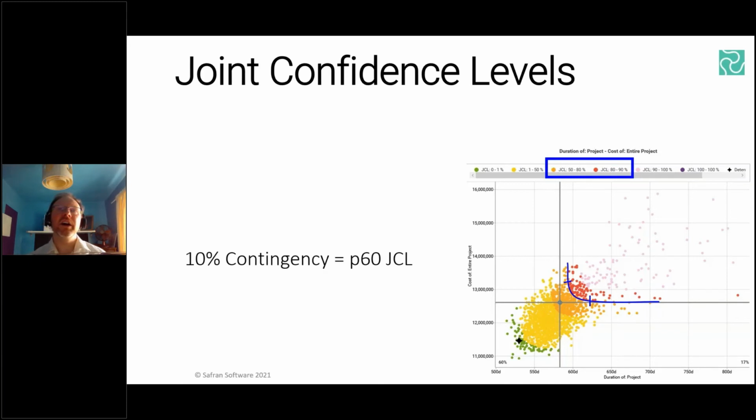And ideally, for a starting point, you're looking at a neutral initial pitch that doesn't favor cost over schedule and vice versa. So aiming for the inflection point of the blue curve, which I've added on for emphasis there, which you'll sometimes hear referred to as the necklace. But essentially, it's a continuum, and wherever you redraw that crosshair along that curve, you'll find 80% of the plot points are found within the bottom left-hand quadrant. So that's how it's behaving.